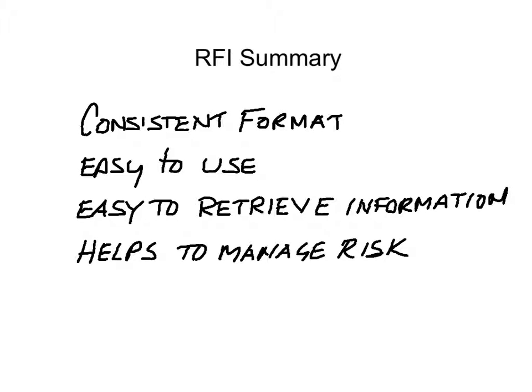In summary, using an RFI system allows the contractor to have a consistent format by which he can ask questions or get clarifications to inconsistencies in the documents. It's an easy to use format. It can be handwritten, it can be typewritten, but in any event, it's an easy format for someone to pick up spur of the moment, ask a question, try to get an answer. It's easy to retrieve the information because of the way that the information is placed in a log. So every RFI that's been issued can easily be viewed in one document.